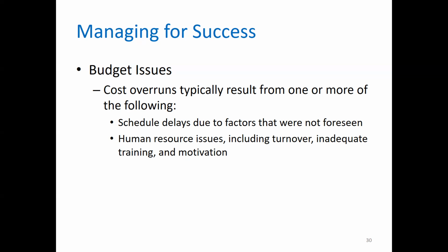Now, unrealistic estimates, if I have to give an example, would be something like this. If I know a task in a project, and I was too overconfident and said it will take 4 days to complete, but instead of 4 days, it took 20 days to complete. That's an unrealistic estimate. What happens is that the project is pulled 16 days into the future, affecting the other tasks and also the resources.